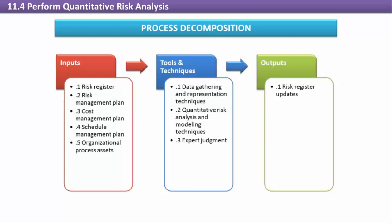Quantitative analysis at the individual risk level can then be aggregated into estimates for the probability of achieving project objectives like scope, budget, and schedule.